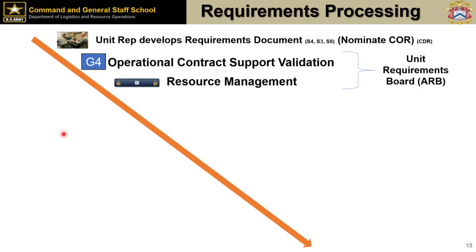And that's where you're holding your requirements boards, Army requirements boards or acquisition requirements boards. But the unit, the operations people are doing that. Generally, they're chaired by the 3. And the 8 is there, the whole staff, maybe the commander or the deputy commander. But y'all just, the requiring activities doing this, deciding, yes, we want to contract for this resource and here's what it's going to do. Then it goes to the contracting folks, who are involved early on to make sure you get a better product.